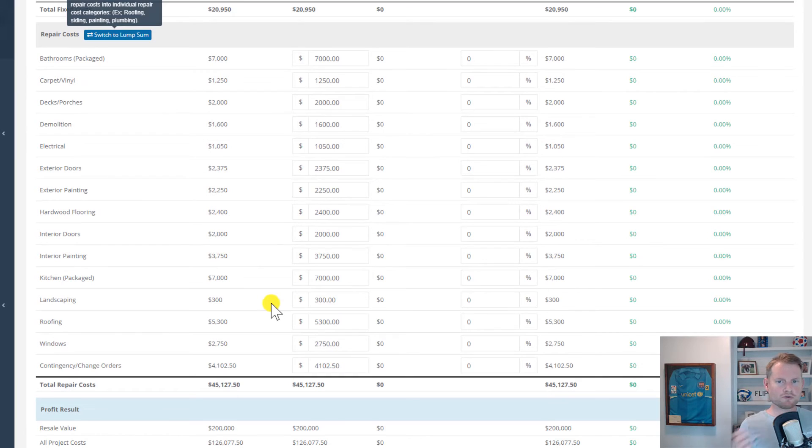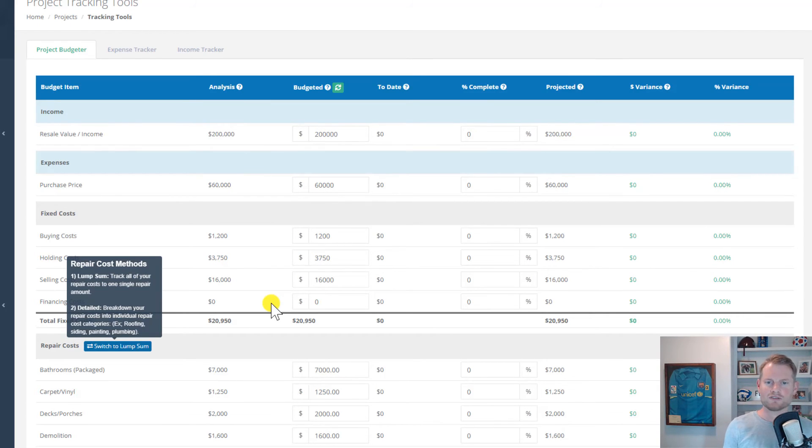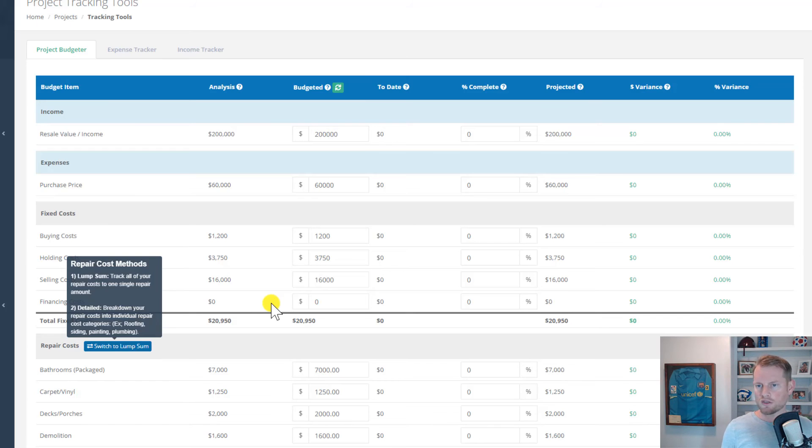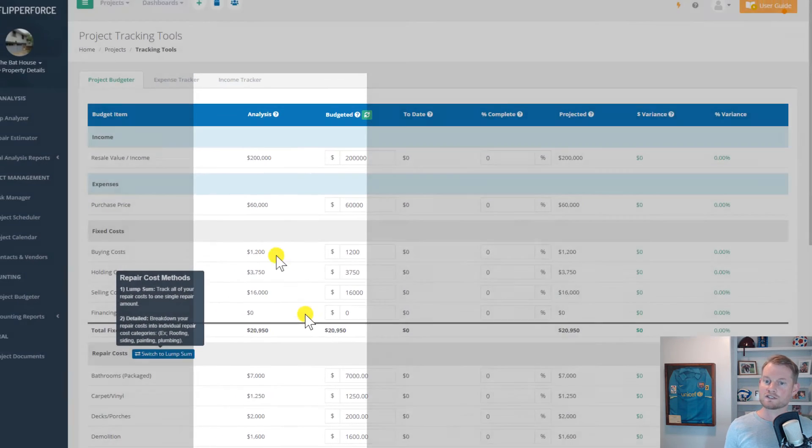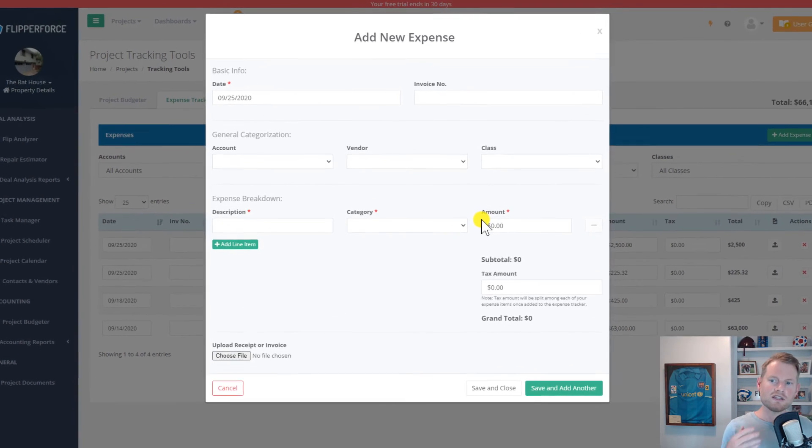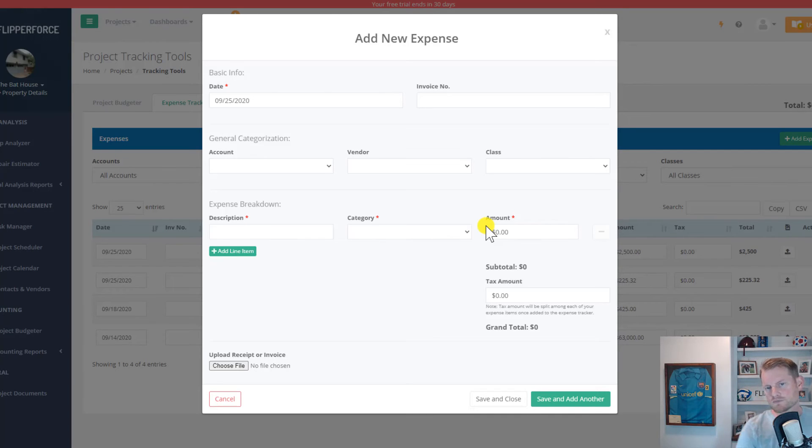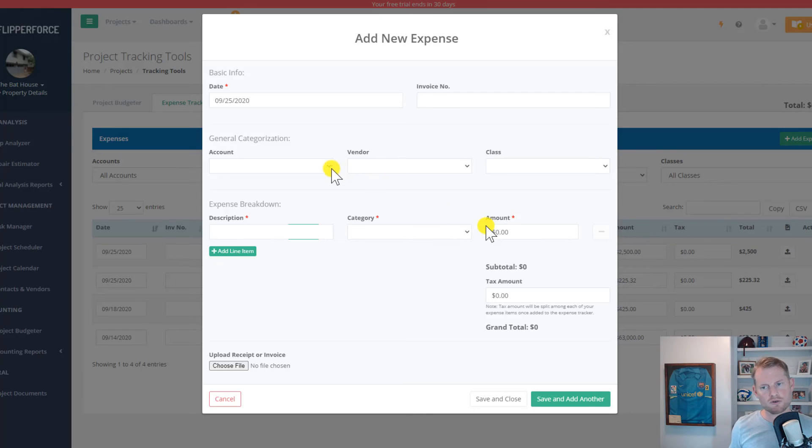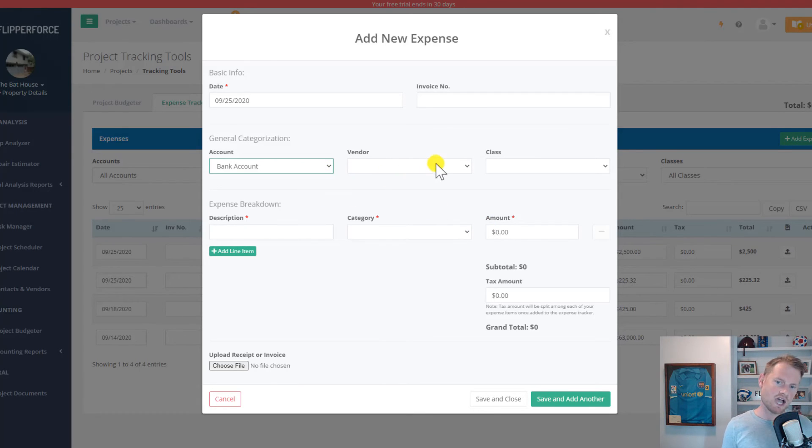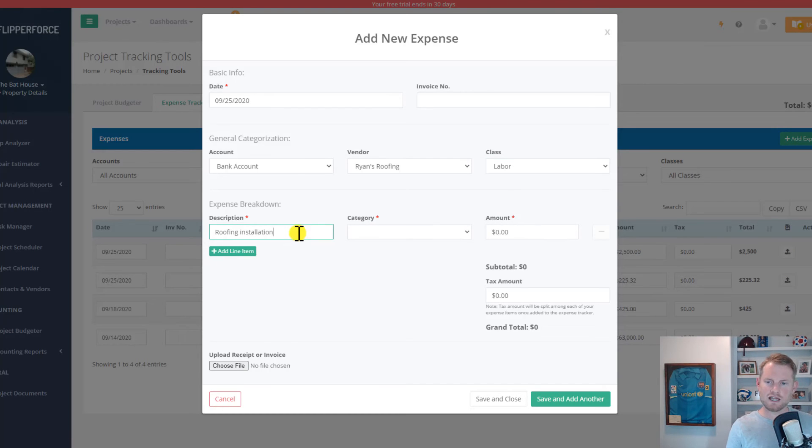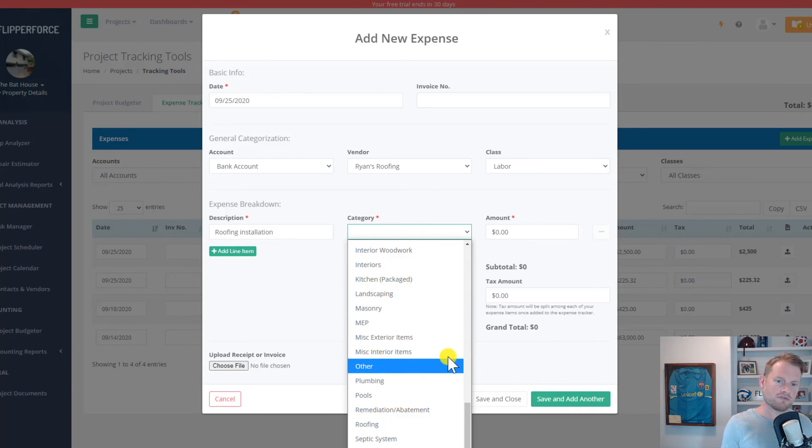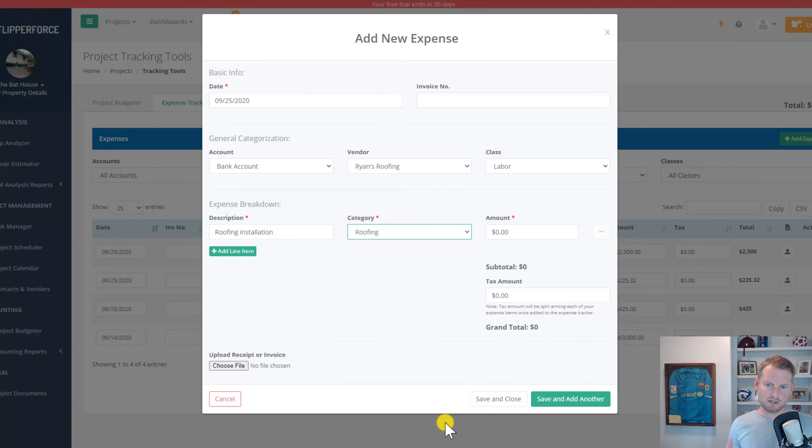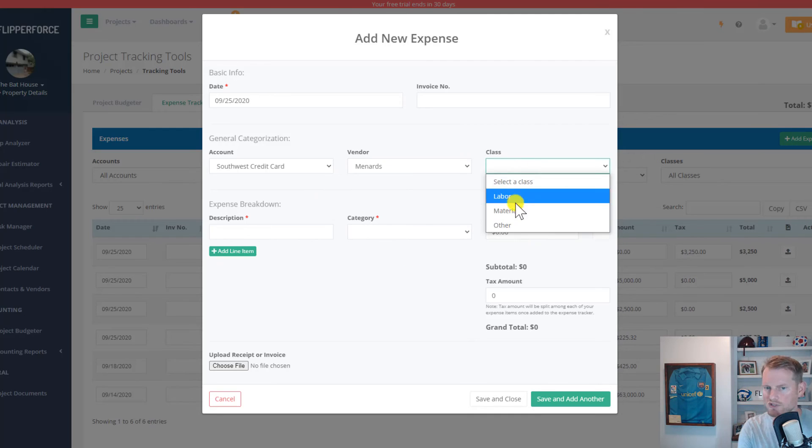When you first initially analyze your deal and estimate the repair costs using our flip analyzer and repair estimator tools, all of that deal analysis financial information is used to establish a budget for your project, which is then shown here on the project budgeter in our analysis and budget columns. You can then use our expense tracker tool to track all of your actual project expenses that you can then compare to your budget to forecast your budget overages. On the expense tracker, you can track your expenses by financial accounts, such as your bank accounts or your credit cards. You can track your expenses by your vendors, so you can see how much you've spent at Home Depot or how much you've paid to a particular contractor on the project. You can categorize your expenses to track how much you've spent in a particular category, like how much you've spent on roofing, windows, or cabinetry, so that you can compare those actual expenses to what you originally had estimated and budgeted for the project.